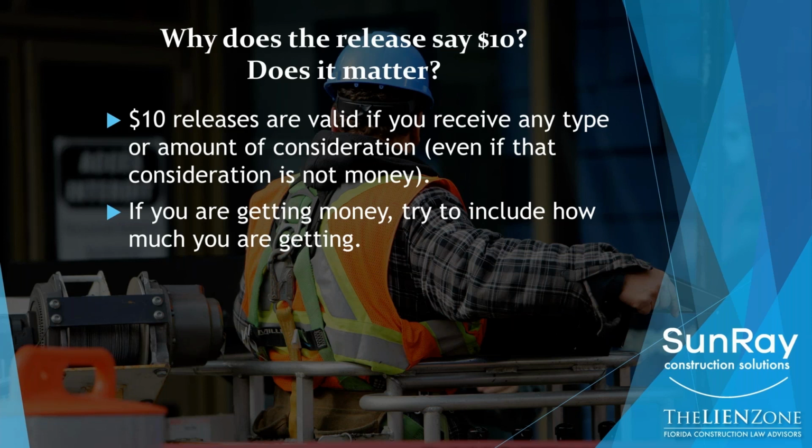Issuing a $10 release at that point is perfectly fine as a sub, right? It's going to say, we're going to get a release from you because you issued a notice to owner. It'll cover a month of time, and it'll say $10 because I'm actually not giving you any money, but I still need a release from you. So that's a situation in which a $10 release is perfectly fine.